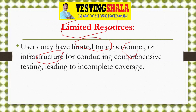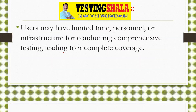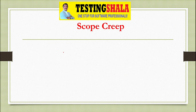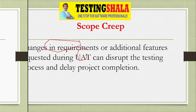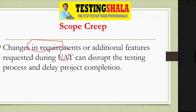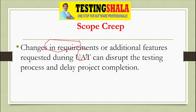The next challenge is scope creep, where requirements are changed frequently or additional features are added into the software. This can impact UAT, abruptly stop it, or cause it to restart, ultimately delaying the overall project completion.